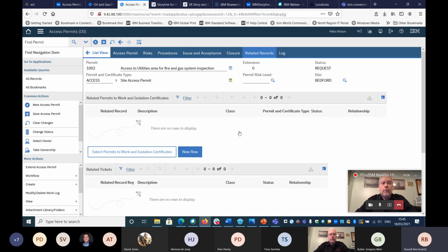If you were, say, implementing permit to work and just doing permit to work on its own, then you have some related things you'll usually do with it around risk assessment and hazards and some of those supporting capabilities. So permit to work would be one of the more complex things to implement on its own. And that might typically take around 6 months, just from what I see of customers.